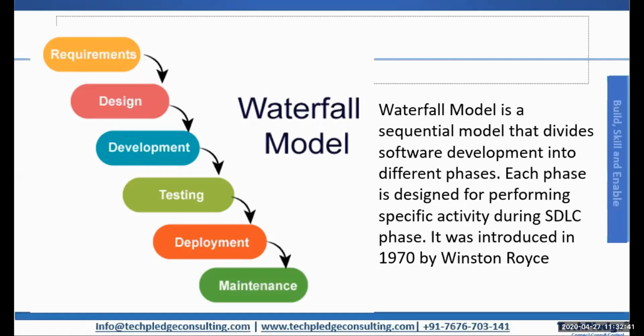You get the approval from the customer, then send that model or architecture to the development team. They develop the project, and then it goes for testing, then deployment, and then according to the feedback, it goes to maintenance or rework of the development. So the entire project is worked as one task, and it is followed in a sequential method.